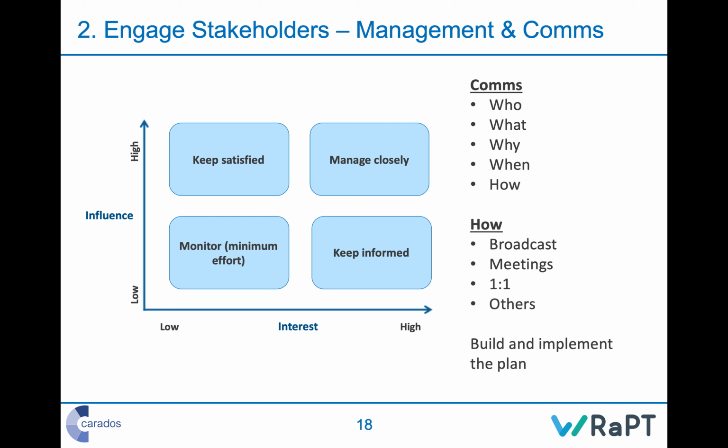When you're coming up with a comms plan, you think about the questions. Who am I communicating to? What am I communicating to them? Why am I communicating to them? How often? When do I communicate with them? And how am I going to do it? Am I going to do it through a broadcast, an email or whatever else? Am I going to do it through large meetings, fora, whatever? Are we going to do one-to-one meetings, or am I going to use various other techniques that you may be able to come up with from a communications point of view, including various online opportunities, whatever else you've got. So you need to think about those different elements.